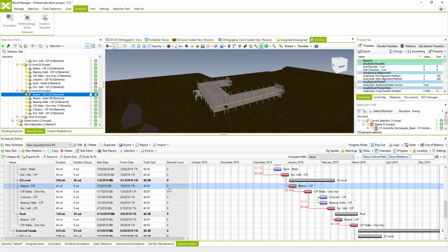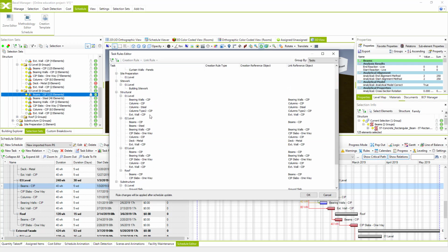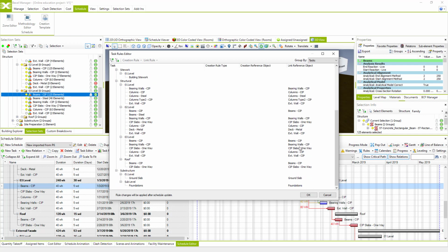This is a common problem, and this is where our users usually struggle, because they usually link leaf tasks, and they expect that everything is working and they can see the simulation. But in order to do it, you have to link also the parent tasks.